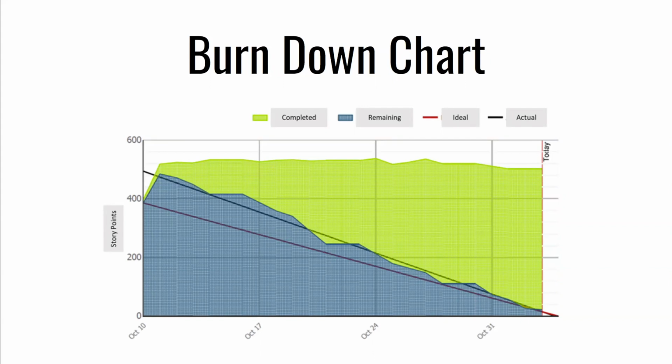You typically see a little bit of a spike at the beginning of a sprint because you're planning iteratively and you're planning just in time with a lot of things. So there is some discovery at the beginning where you may have some new stories come in. And in this case, because you're going about a month's time for a sprint, and because you had a larger team, you had more variability. Now, with smaller teams and a shorter time period, that little bump in the beginning will be less because there will be fewer things to review and get ready for in those sprints. And again, in modern day Scrum, you're using smaller teams, you're doing things in a much shorter time period. So all of this tends to get more accurate.